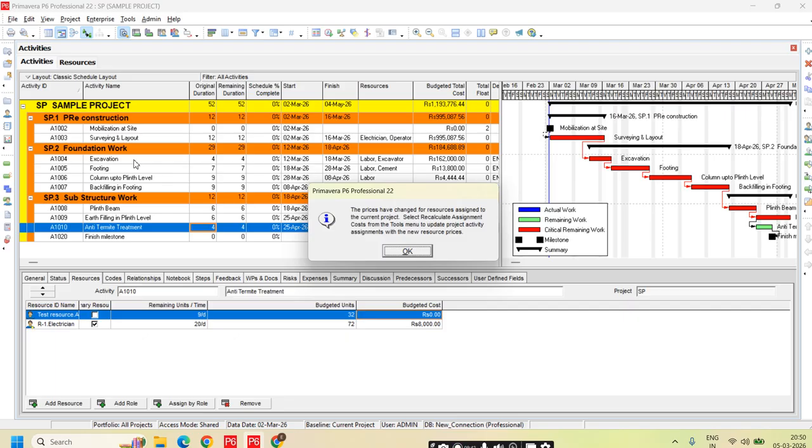So as per the building area, that quantity or volume will be calculated first, and accordingly the costing also, like what is the material cost for cement or sand. So that data will be prepared separately, which we call bill of quantities. Actually, in Primavera P6 or MSP, you won't have BOQ data.